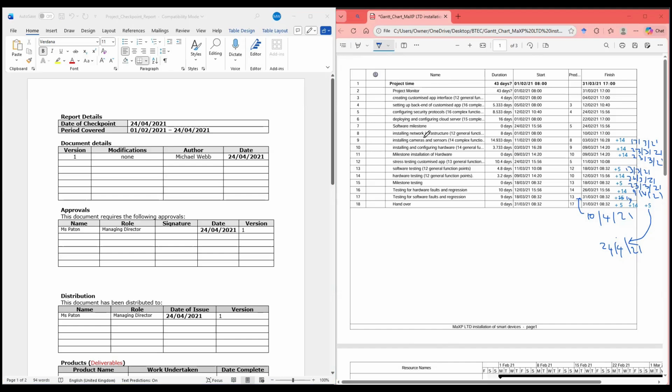So it affected all of the project because the issue started with the smartphone app, right? And I think on our, if we double check it, on our paper A, there was some smartphones that we had to use, right? And that would be a part of your equipment that was delayed, even though there's a camera thermostat locks. But if that's delayed, then it's going to affect the whole project. So we're affecting the whole project here.